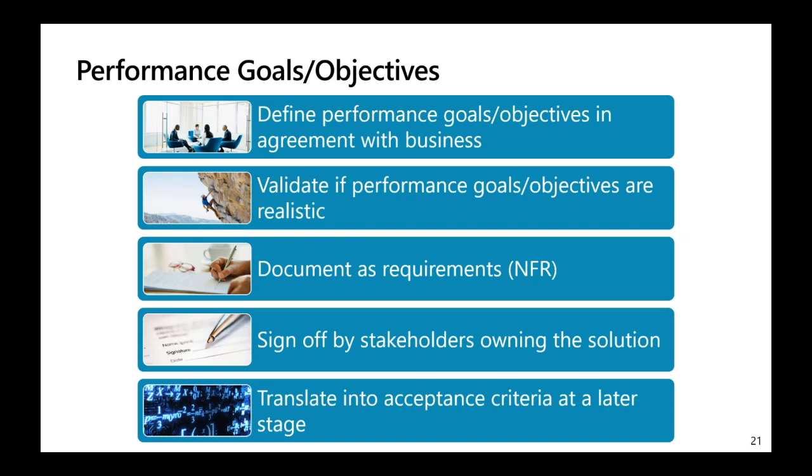In this situation, it's advisable to run small proof of concept pilot projects to understand feasibility as early as possible, thereby minimizing the risk of accepting unachievable requirements. Discussing requirements that are unachievable with the business is generally a more positive discussion during the early stages of the project than during user acceptance testing or immediately before going live.